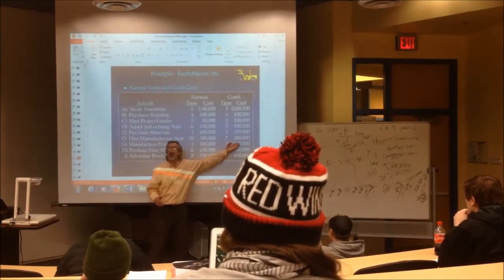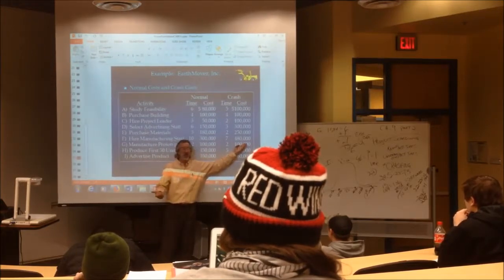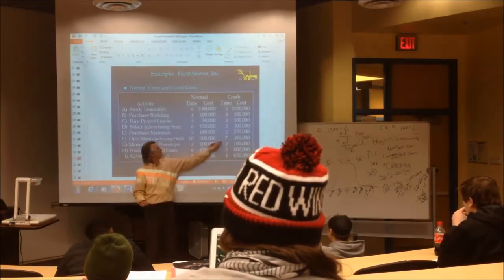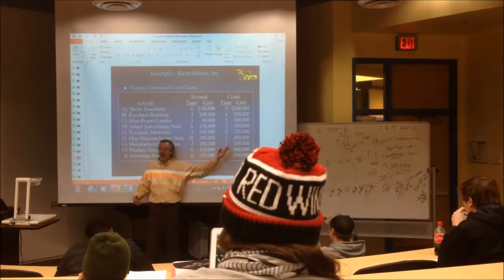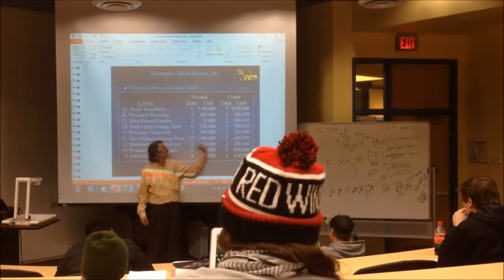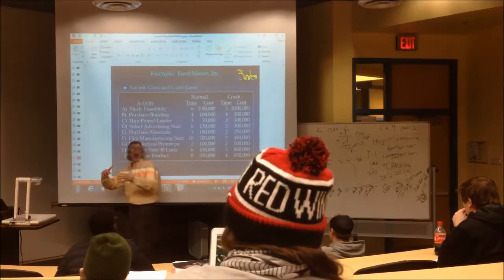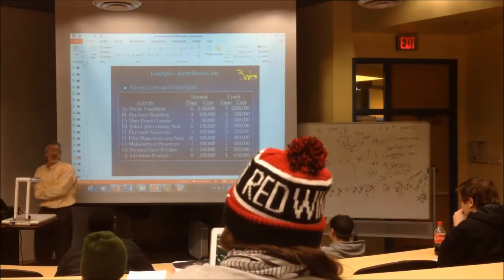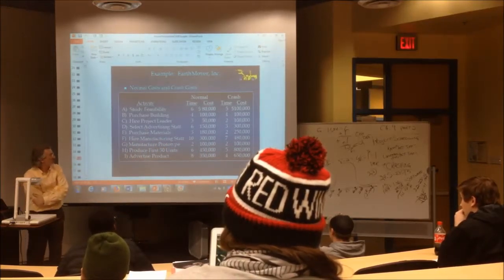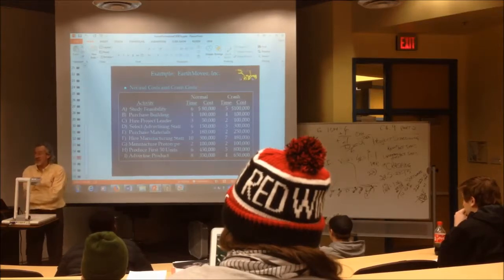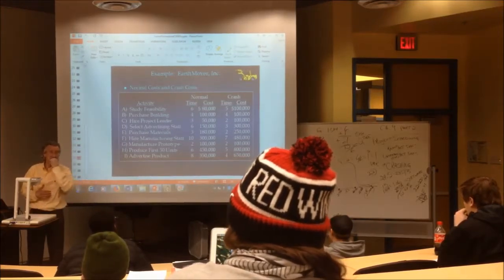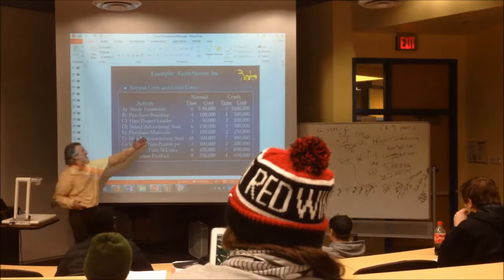How fast could you get it done if more money were involved, and how much more money? And they say, well, we could get more people on it, do interviews faster, do the background checks, and we could get it done in 7 weeks, but we have to use more staff, so you're looking at an extra $180,000. So 300,000 goes to 480,000 if you want to get it done 3 weeks faster. And this goes on with every activity.